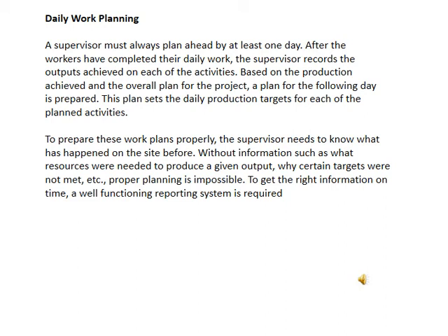To prepare these work plans properly, the supervisor needs to know what has happened on the site before. Without information such as how many resources were needed to produce a given output, why starting targets were not met, etc., proper planning is impossible. To get the right information on time, a well-functioning reporting system is required. This is the requirement for the daily work planning.